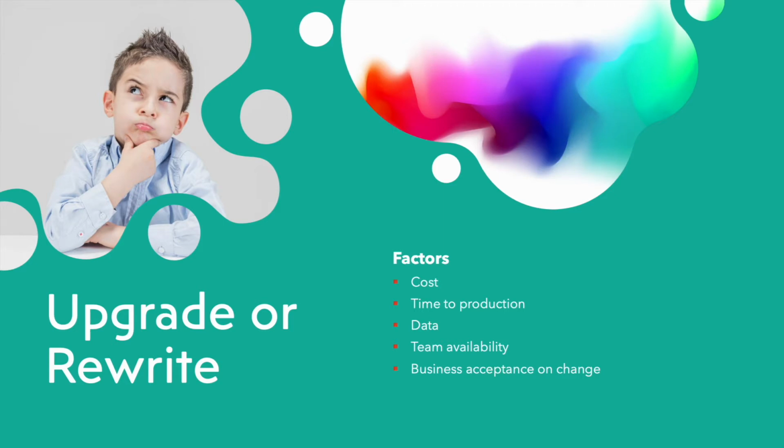If your application is very simple, one or two case types, then maybe rewrite will be cheaper than upgrading. But if your application is very complex and has many case types, then maybe upgrade will be cheaper.